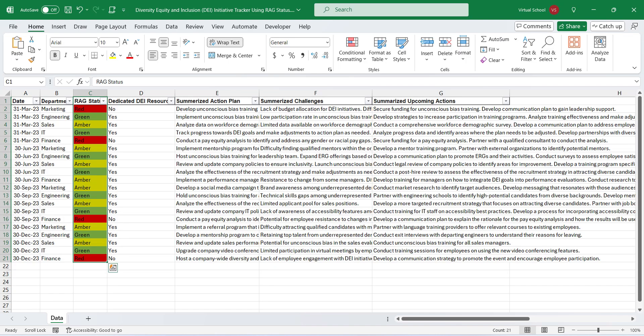RAG status may represent the timely achievement of a target, such as green for on time, amber for slight delay, and red for inability to achieve target on time. Or it may represent percentage of completion, such as green for 100%, amber for 50%, and red for below 25%. Additional colors may also be adopted to communicate nuances of status.